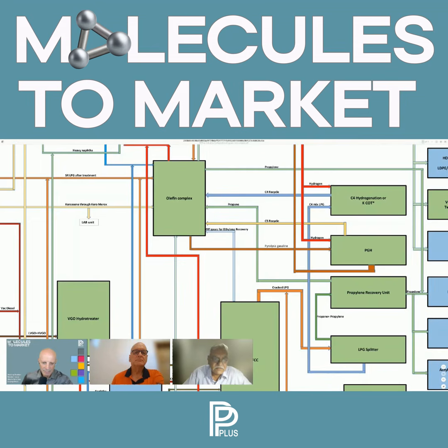Now, when I have to go for a BOO process, I don't have to worry about technology, because technology is intrinsic to the plant. So anybody who's putting in money will bring their own technology. The owner has to only take a decision whether they want to go for a BOO process or not. BOO is getting popular, gradually, and that way I think we can save a little bit on cost. So this is the way that we put it together.